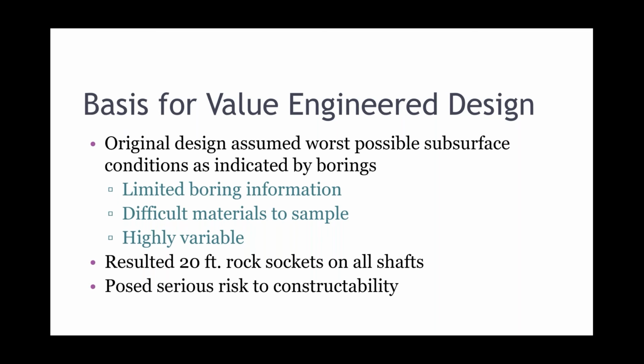Again, a little bit off tangent, in our VE studies that we have participated in over the last couple of decades, typically we find there's got to be something more to it than just money. I mean, we all know how important money is with respect to construction, but the reality is for the contractors to want to take on the design burden, to want to take liability for the design over, there's got to be more incentive than just material savings, typically. In this case, mitigating the risk to constructability was how we got our foot in the door with this VE.